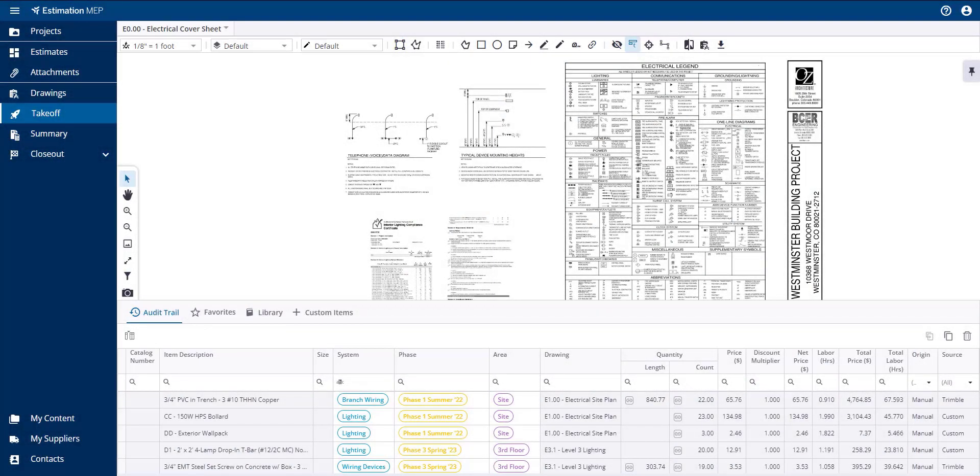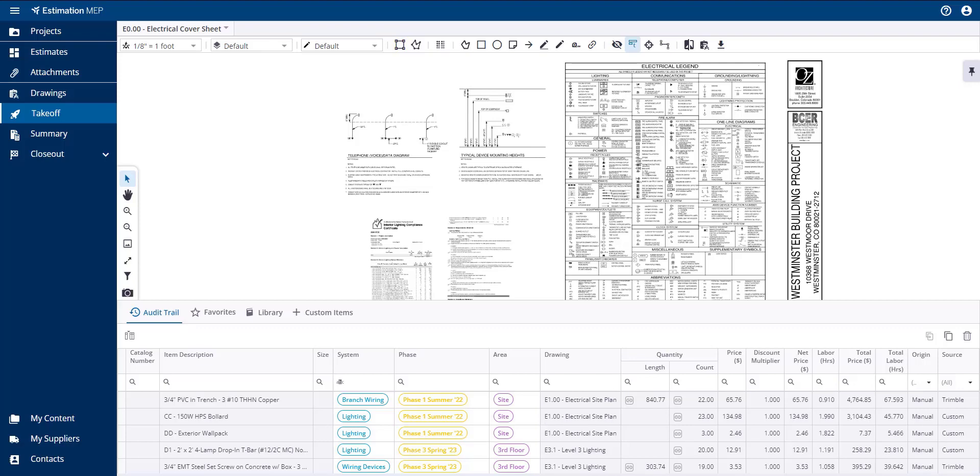When working in your estimate, you're able to assign work breakdown structures to the items or assemblies in your estimate. The available work breakdown structures in this program are area, phase, and system.